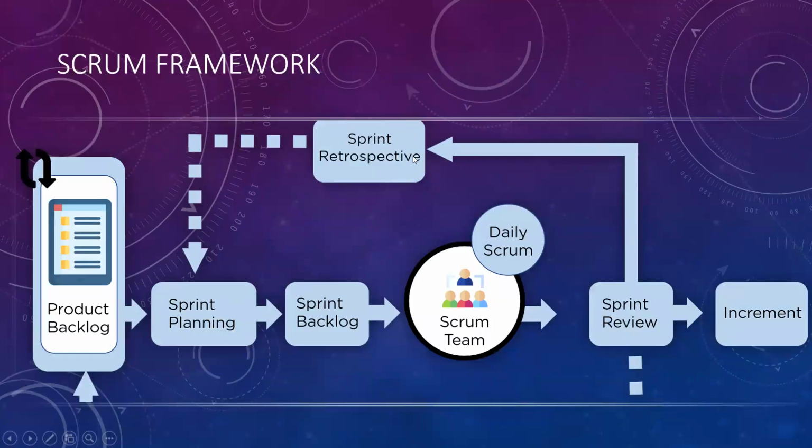For example, let us take the good things. If a person is working as expected, but he took a lot of load in the previous sprint because of inability in giving estimations, here we are going to help him understand the estimations. During the sprint plan we'll say, okay Mahesh, now you don't take this much load. Last time we did the same thing. So first you take 2 items, then after that you can take 2 more items. Likewise, you can keep on incrementing by yourself. So these are the things that are discussed in the sprint retrospective.